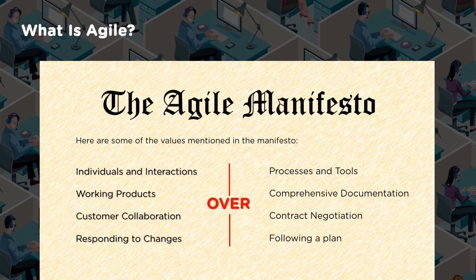Now if I have working products, if I have a bigger product, then a module of that I keep creating, every small module of it, and start integrating into the base model. Now I will only focus on the documentation for that particular working piece which I am going to create in the next iteration. Then my documentation changes are less. And also the way I'm making the documentation is, initially I would have a full skeleton of the entire product which I'm going to create, the roadmap. And upon that I make the detailed documentation only for that working piece rather than the full product itself.